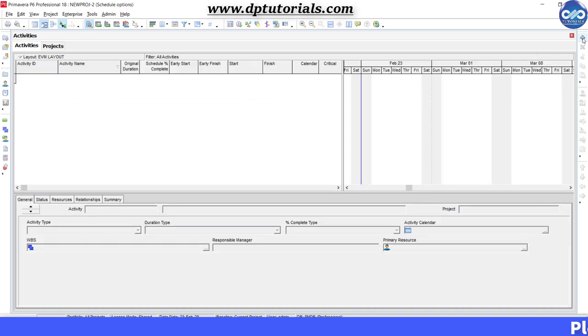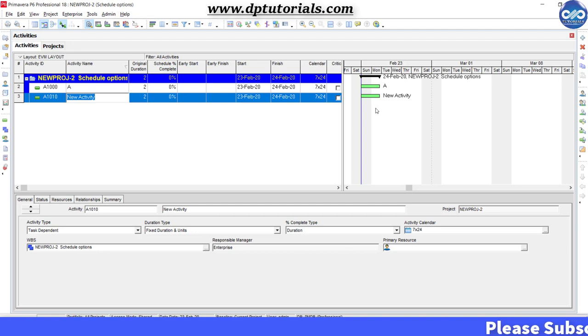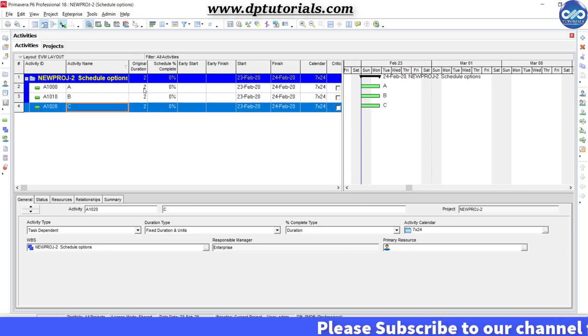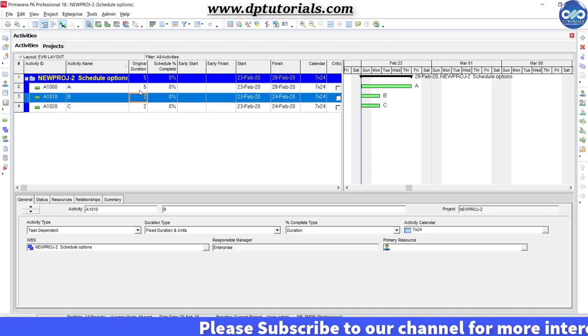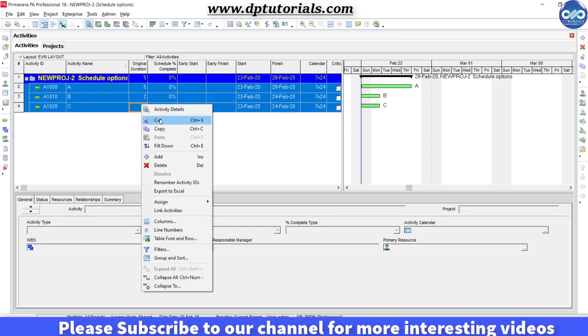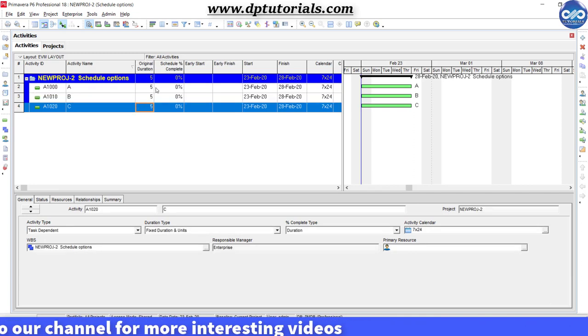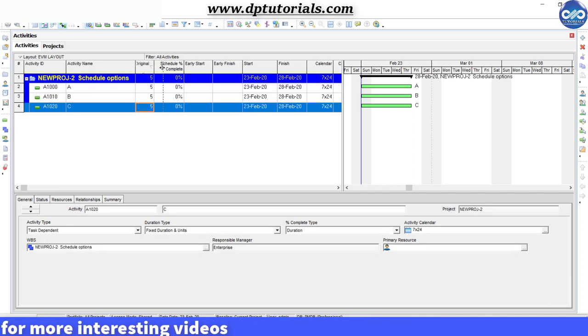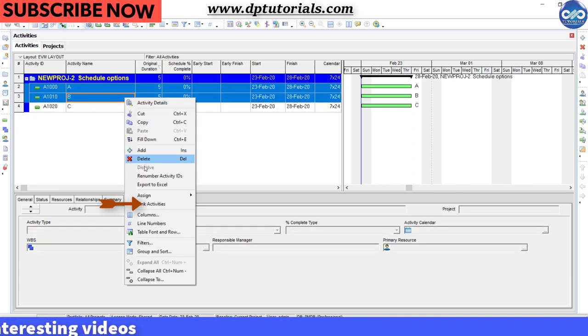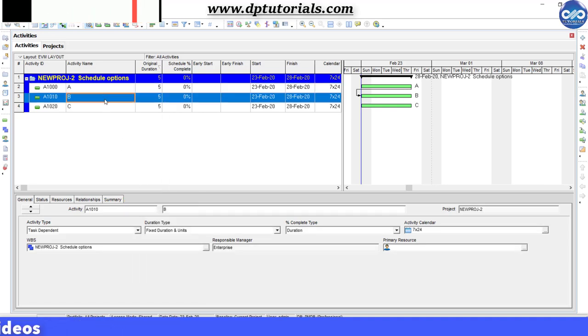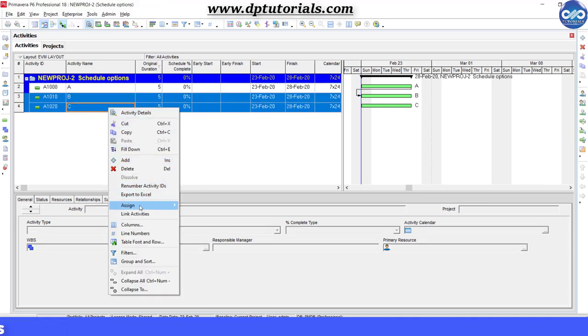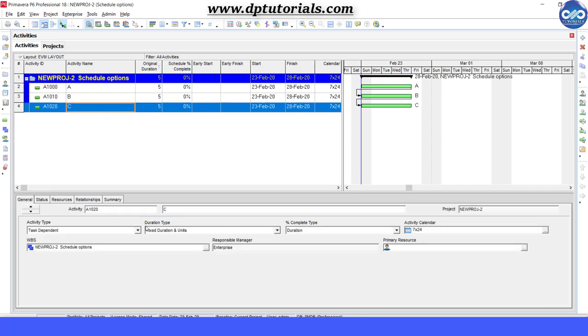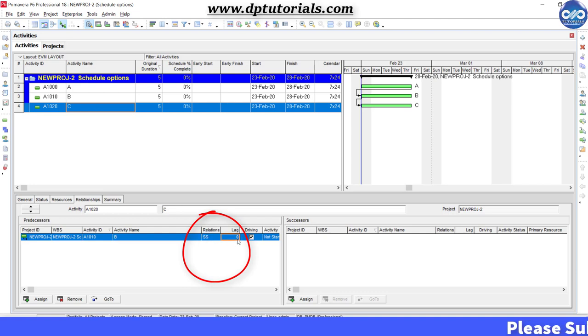Create three activities: activity A, activity B, and activity C. Give five days as duration for all three activities and now set the relationships between A to B as finish to start and B to C as start to start with a lag of two days.